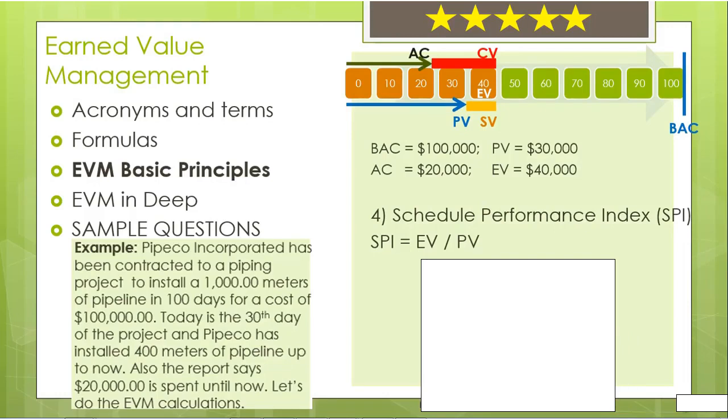We already know earned value is the value of the work done until now in dollars. Remember, planned value was the estimated value of work as of today. Therefore, by dividing these two values, we will obtain the progress relative to what percent we originally planned at the very beginning of the project.